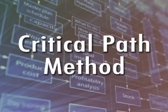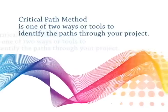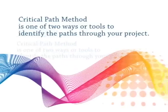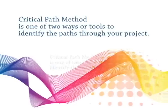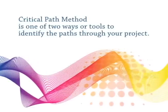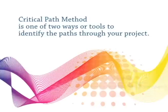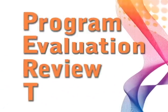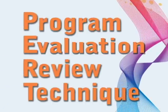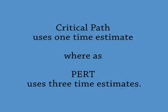Let's talk about the Critical Path Method. The Critical Path Method is one of two tools that you can use to identify the paths through your project. The other way is called PERT, Program Evaluation and Review Technique. The difference between Critical Path and PERT is that Critical Path uses one time estimate whereas PERT uses three time estimates.